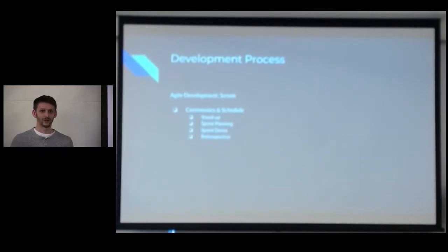Then the first Friday of the sprint is kind of just a status update. It's great because we can meet with our sponsors after the first week of working on something and then determine if we need to work on it some more or if we need to maybe add some additional time to that item. And then the last Friday of the sprint is a demo where we demo what we've accomplished during the 2 weeks.